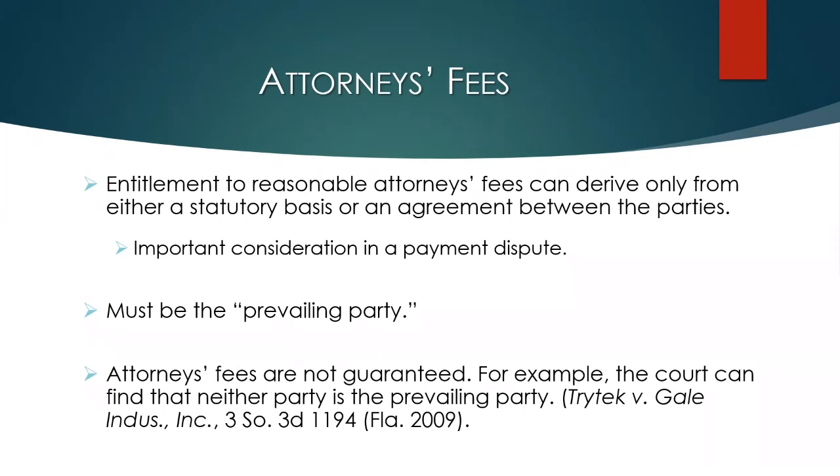So just using an example, let's say you're owed in the range of $10,000. Well, if you're not entitled to recover fees, the GC can just sit back, not pay you, and feel pretty confident that you're not going to sue them for it, because it's going to cost you a lot more than $10,000 to pursue that lawsuit. So it doesn't make financial sense, and you're just going to drop it and let it go. And it's that reason why it's critically important to have entitlement to attorney's fees, and out of an abundance of caution, you should put that in your subcontracts.